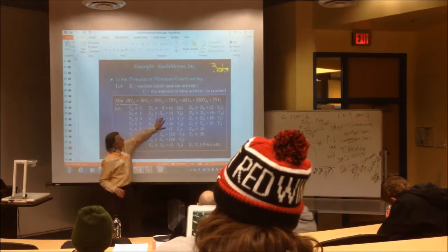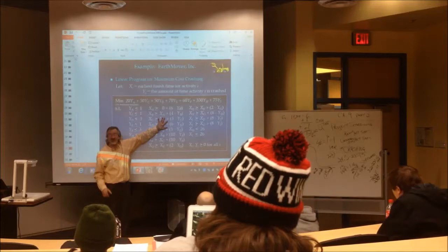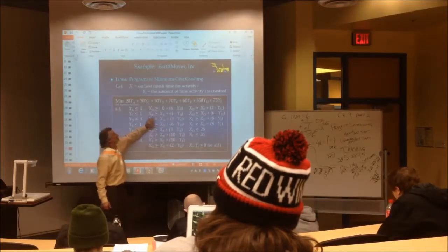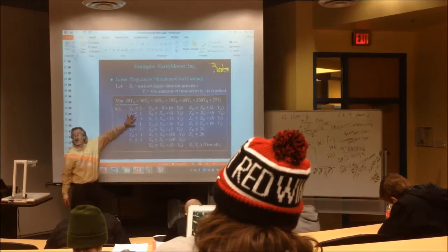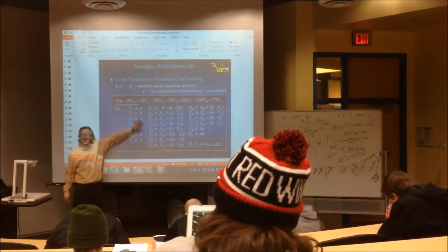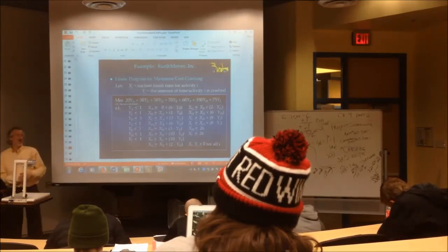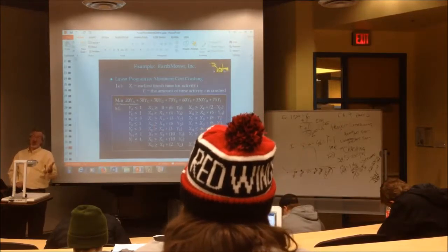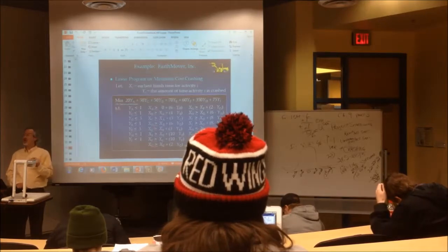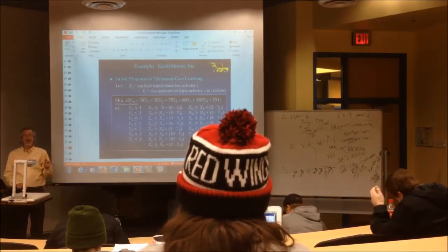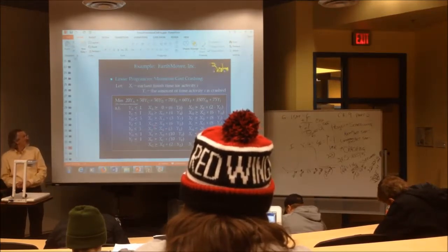These X constraints are called activity constraints. These Y constraints are called Y constraints. They're really your crashing constraints. The Y variables represent the amount that each activity could be crashed. Let me repeat that one. The Y variable represents the amount of each activity that could be crashed. They're called your Y constraints or crashing constraints. I always call them the Y constraints.